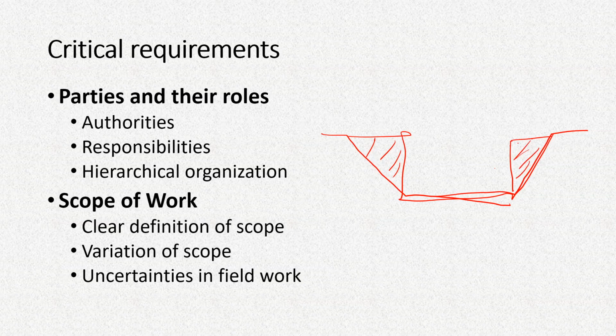In that case, this extra amount of excavation is to be carried out by the contractor. Now, is it included in the contract document? And if such a thing is encountered, what will be the next step? All these things are to be very clearly mentioned, and if they are not, then they may lead to lots of disputes in the future.